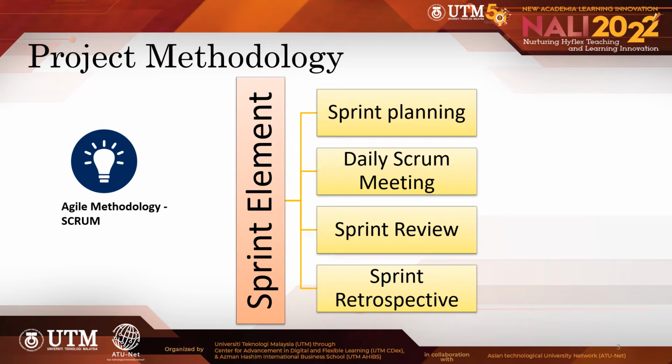And finally, the sprint retrospective. Before starting a new sprint, the team concluded the work and created improvement plans for future sprints based on their experience from past sprints. For the class project, the project manager joined in.